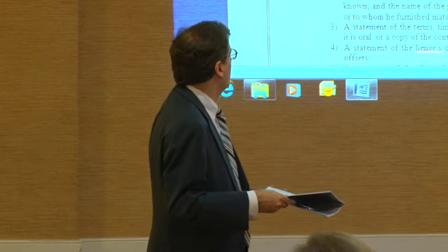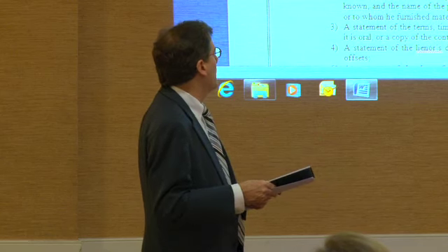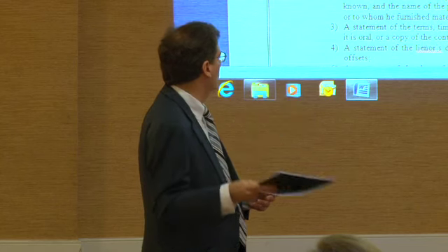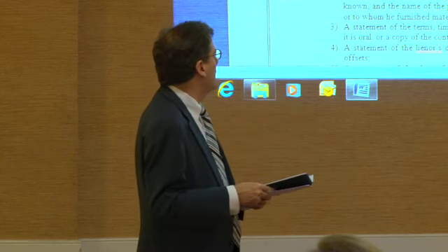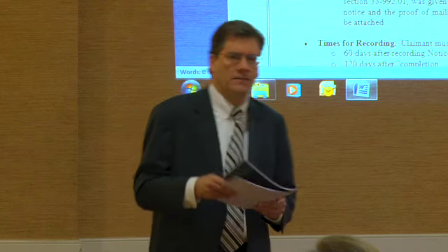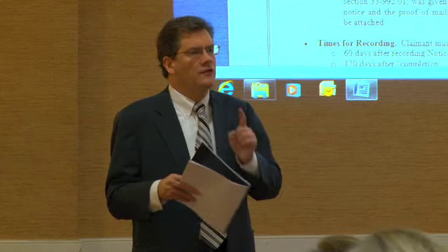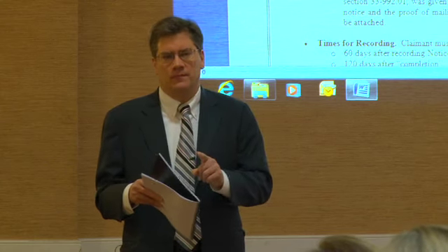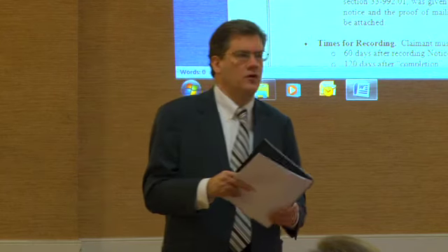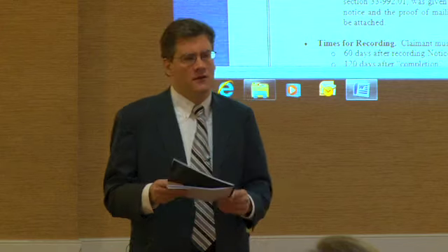The contents. A lien claim is a statement in writing verified under oath by the claimant, or by an authorized representative, which is the lien service or an attorney, that contains the following. First, a legal description of the lands and improvements to be charged with a lien. It's very important that you know that lien claims in Arizona must have an accurate legal description. All right? You can't get that part wrong. It can't be a street address. It can't be cross streets. It can't be a general description of the project. It's got to be the right legal description.